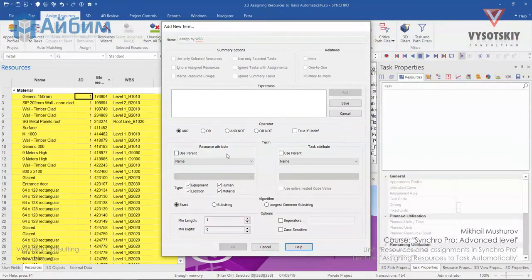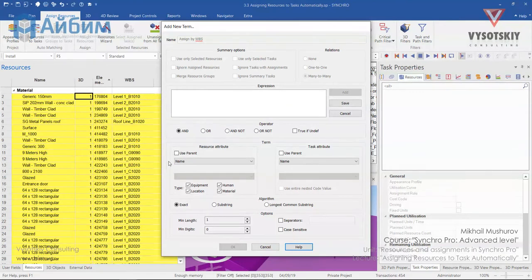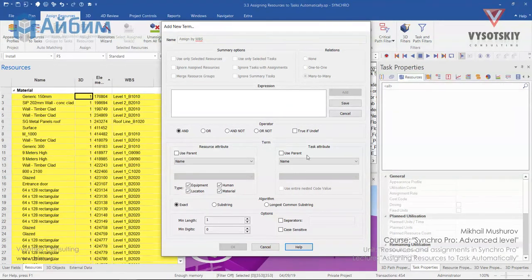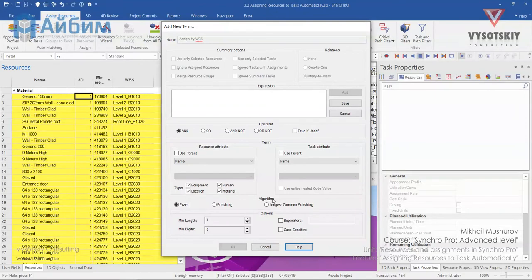The Term field is divided by two. So on the left, you can see resource attributes. And on the right, you can see task attribute. We have to select a matching attribute in both fields.